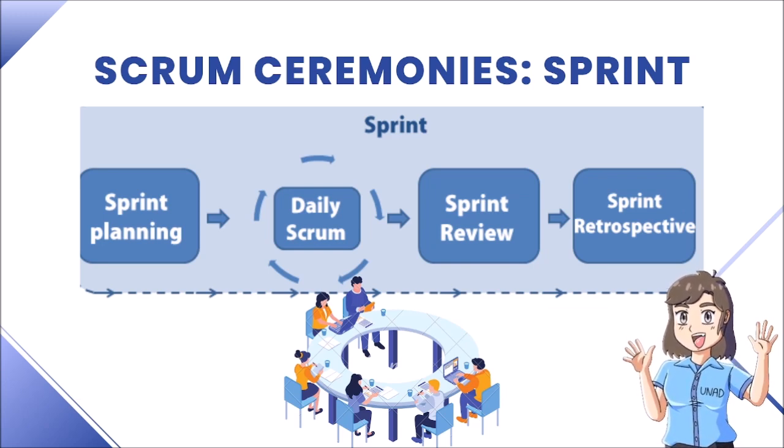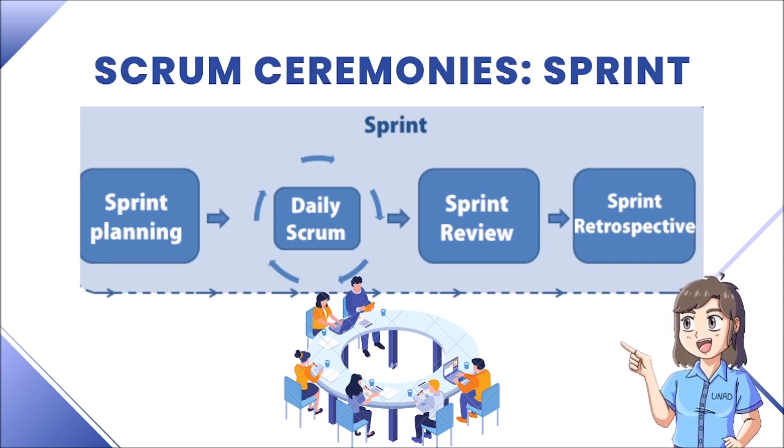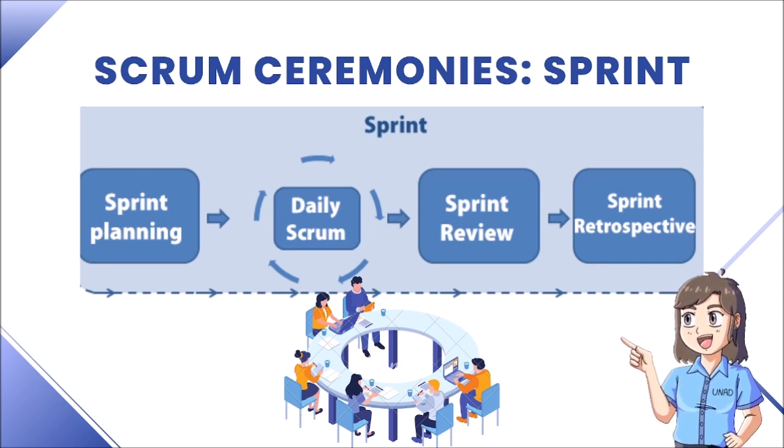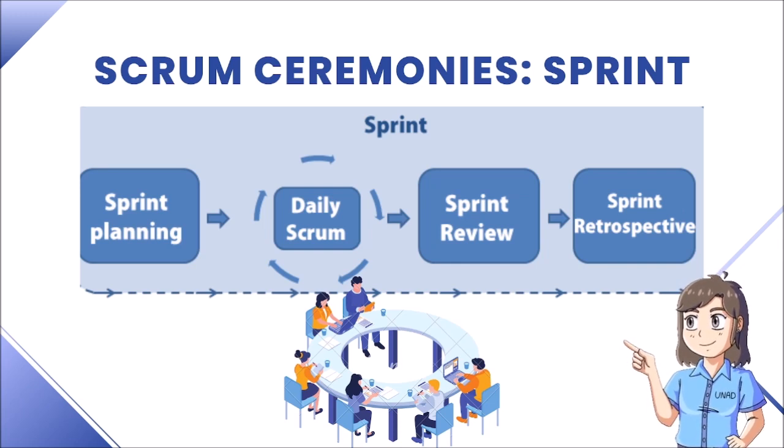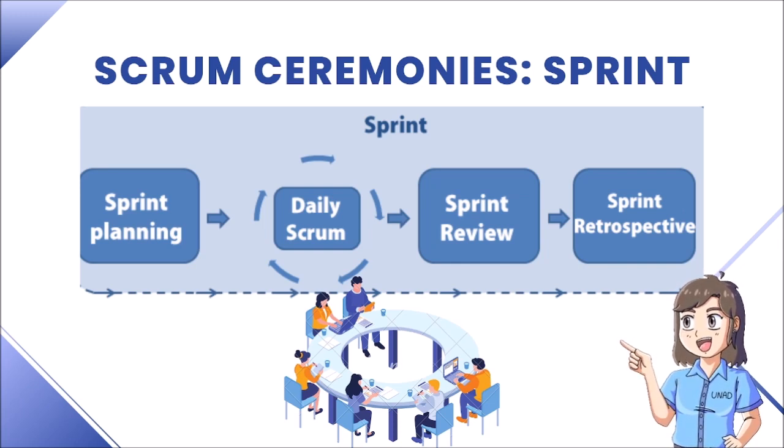In the daily Scrum, the development team meets to inform each other about completed tasks and impediments that block their work. In the sprint review, the finished sprint is reviewed, and there must already be clear and tangible progress in the product to present to the client. And in the sprint retrospective, possible process improvements are identified and a plan is generated to implement them in the next sprint.